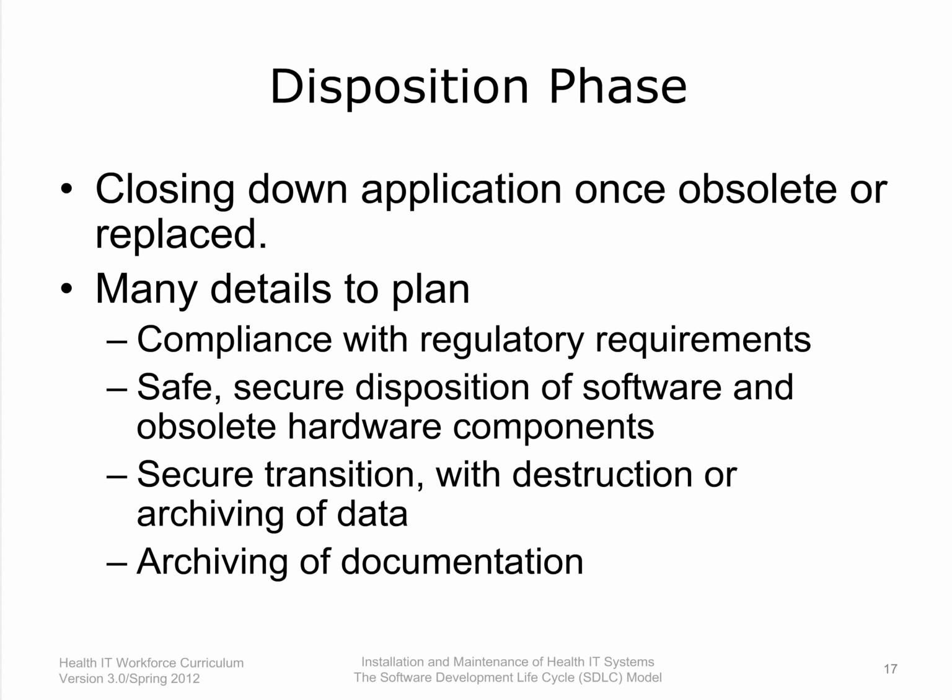Slide 17. Every software application eventually becomes obsolete. Perhaps a new system is being developed, or this system cannot keep up. Whatever the reason, disposition involves more than just shutting off the server. Often the system may be kept going due to regulatory requirements or because there are still projects using it. Sometimes there is data on board that must be kept safe and secure even after its useful life is over. Software disposition needs to be planned to ensure that you meet all regulatory requirements and ensure a smooth transition to whatever the replacement product will be.